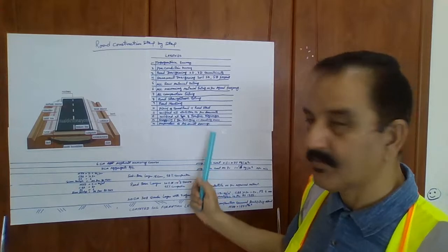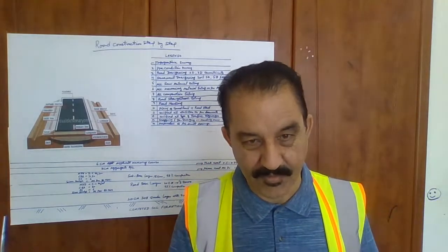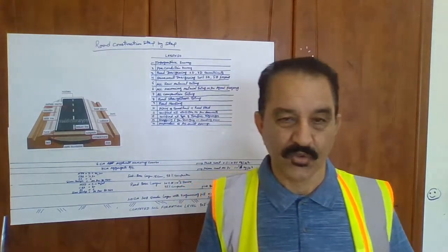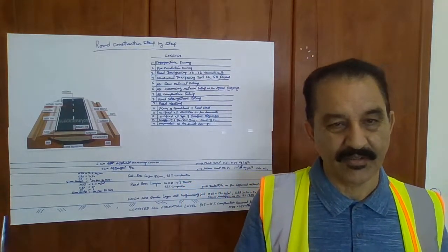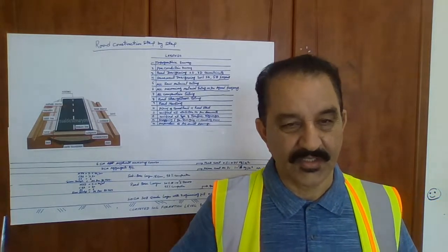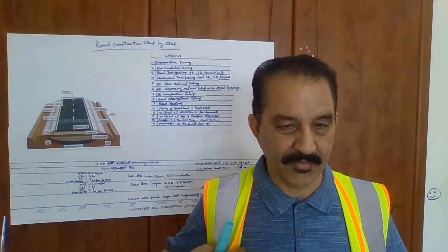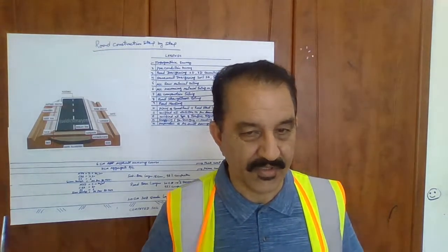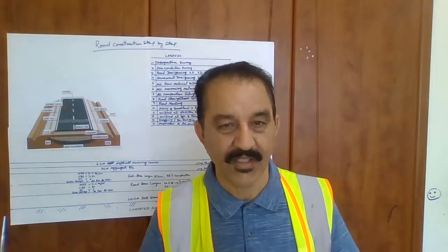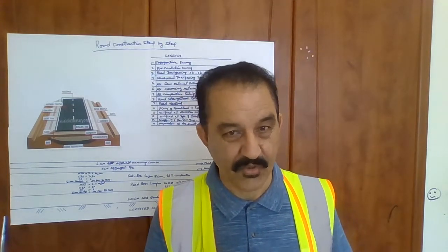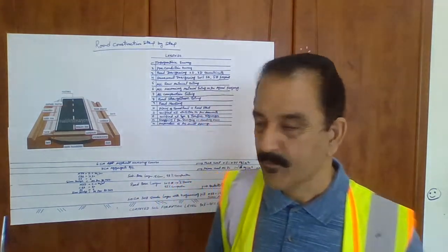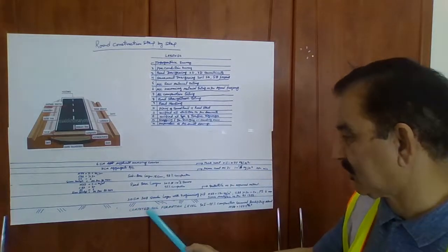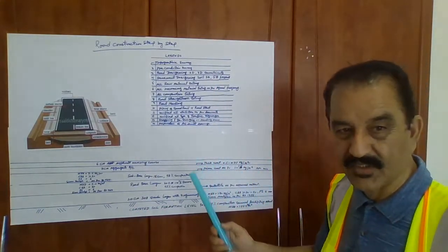And then, finally, preparation of the as-built. So after completion of all the roads and everything, the as-built should be updated. This is the asset as-built, and according to the project specification and the procedure, it should be conducted. And once it is completed, the complete road will go to the authority. So we will discuss the road construction after all of this consideration.